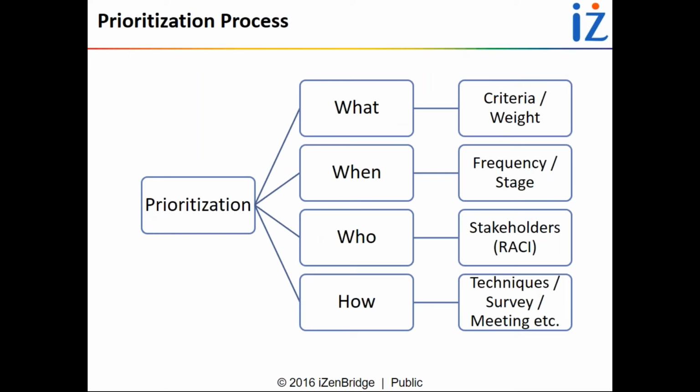To identify priority, you need to involve stakeholders. And who will be involved? It is also influenced by the selected life cycle. When you are using agile, when you are using an adaptive life cycle and the Scrum framework, it is a known truth that the product owner is responsible for requirement prioritization. But in a real scenario, it is a collaborative effort.